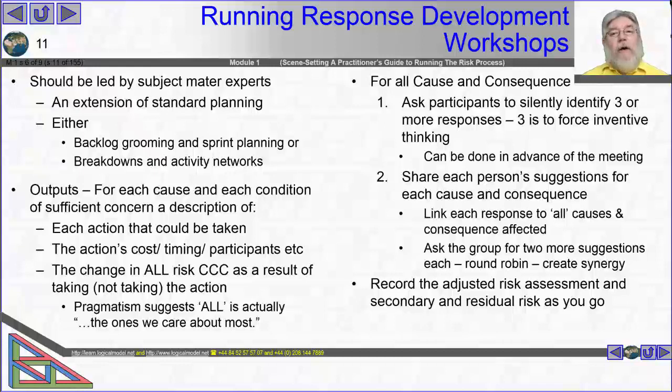Now that's all very well, those steps that I've just been through there. So I hold a planning workshop, I get the scales, I get the sponsor bought in, I hold an identification workshop, get lots of concerns voiced, we put those into good format, and then we think about what could we do about each of those risks. And that's a nice tidy way to run risk workshops.